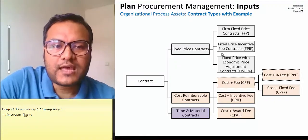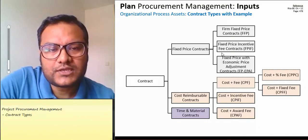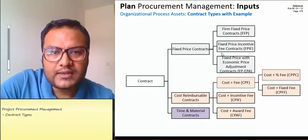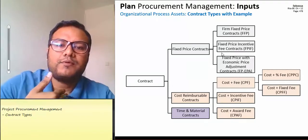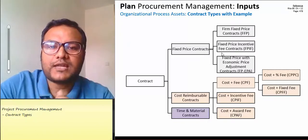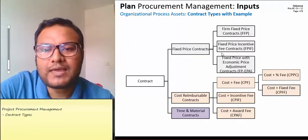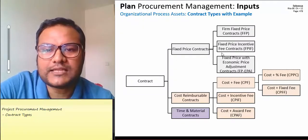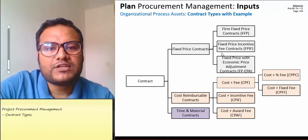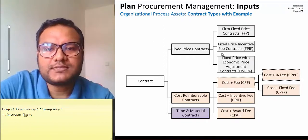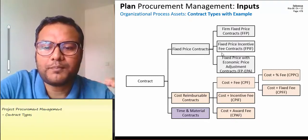Fixed price contract, as its name suggests, the seller will give a fixed amount for goods or services or products. For example, I will give a fixed price contract for a table. The fixed price contract has three parts: the first being the firm fixed price, which means a fixed amount — for example, 100,000 — agreed at the top.